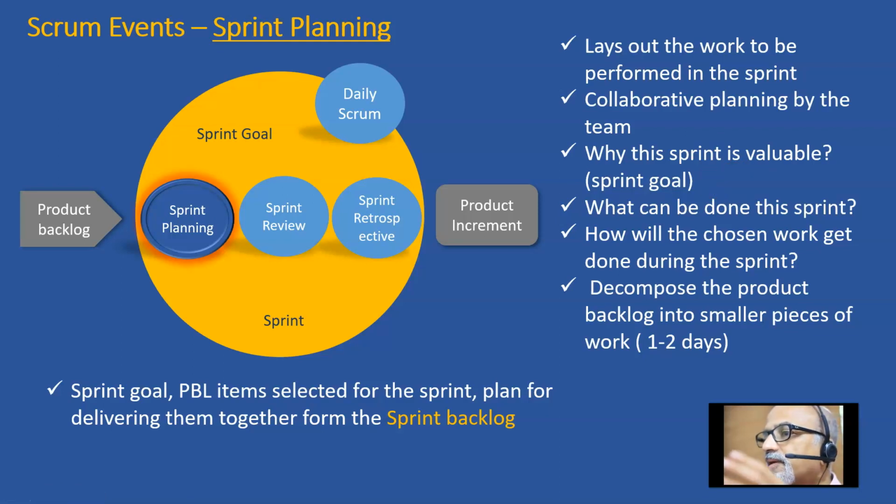So no point in doing a lot of discrete things. No point in developing a lot of features halfway through. So every sprint, if it can deliver a concrete value, then it is better. So we have to define the goal of the sprint so that all the features taken up within the sprint cumulatively deliver that value.